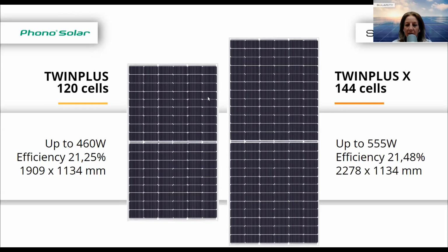And this is something you can count on 100%. Once the deposit is paid, then from 10 to 18 weeks, depending on the module size, you can get it on time. It will be on your project site. This is something I like, that nowadays, when there is a lack of modules for some specific power outputs, it's great that you have a brand that is there for you 100%.